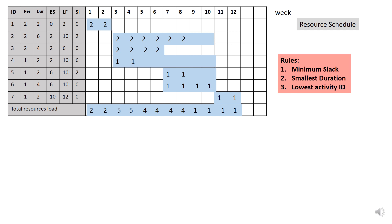At week 3, 3 activities start at the same time. This is where the rules are to be considered. The first rule is to get the minimum number of slack. So in this case, activity 3 is 0. So you do not need to do anything for this activity. Therefore you can load activity 3 in this resource schedule.